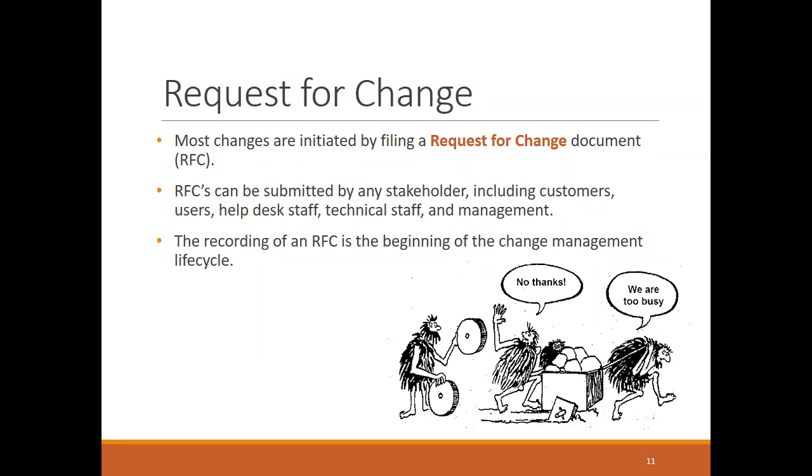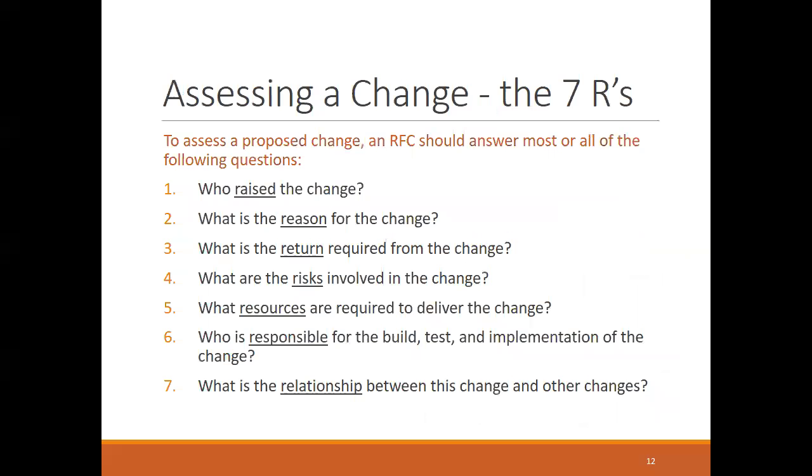Well, the people in engineering and HR really should be consulted also, because you're changing the system, and maybe it will degrade how that system works for these other people. And so we have a committee that's going to look at those things. They're going to look at the request for change and analyze that. They're going to see the impacts that it has on other people, and out of that will come the change.